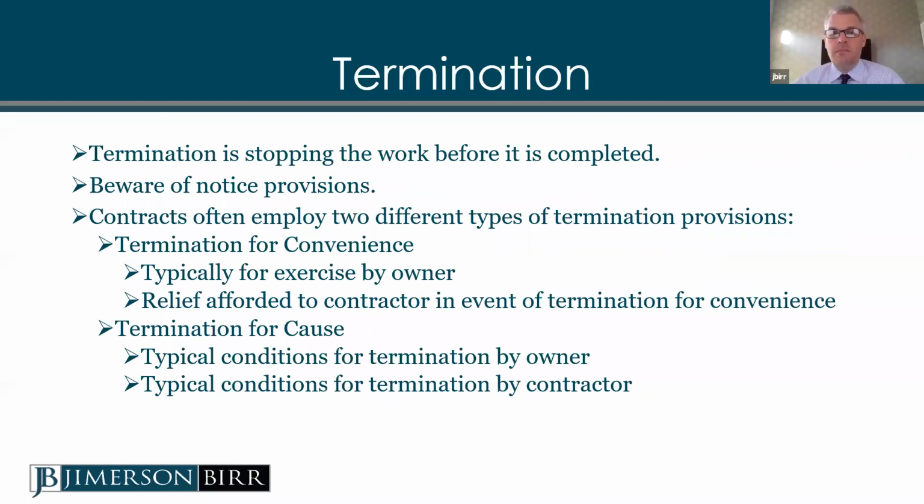Termination, another thing to look for in your contracts. Make sure you understand how that works. Typically that's stopping the work before it's performed, although sometimes there will be termination provisions in the contract that operate on their own, by the time period in the agreement. The contract terminates on its own after a certain period of time. But you need to be aware of the notice provisions that are required if you're the one receiving a notice of termination or you're the one providing it.